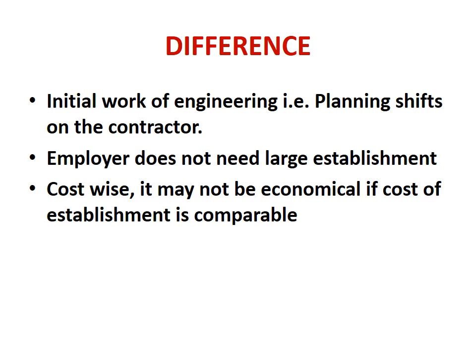And then let us see what makes the difference between the other types of contracts and this EPC. The initial work of engineering, that is planning, shifts to the contractor in case of an EPC contract. Then the employer doesn't need a large establishment, that is, he doesn't need architects or structural designers or quantity surveyors.